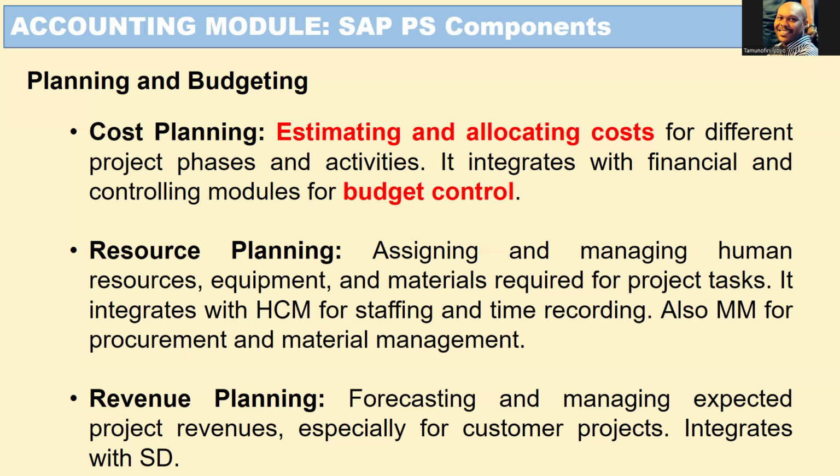In this particular revenue planning, we are looking at the SD module. Basically, we have what we call resource-related billing in the SAP SD module, where PS integrates with the SD module for forecasting and managing expected revenues from customers. Okay.